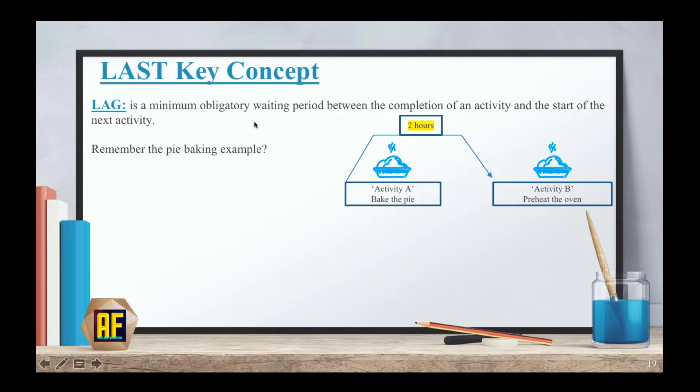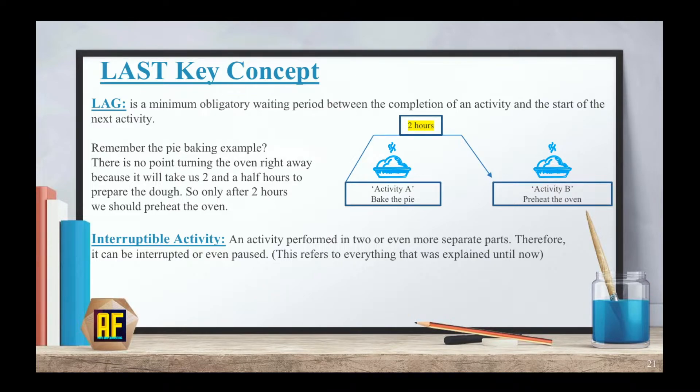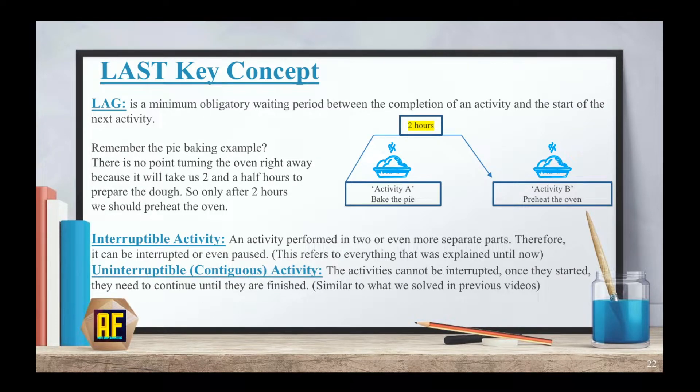The last key concept: lag is a minimum obligatory waiting period between the completion of an activity and the start of the next activity. Remember the pie baking example? There is no point turning the oven right away because it will take us two and a half hours to prepare the dough. So only after two hours we should preheat the oven. Interruptible activity is an activity performed in two or even more separate parts. Therefore it can be interrupted or paused. Uninterruptible or contiguous activity is the activities that cannot be interrupted. Once they started they need to continue until they are finished.